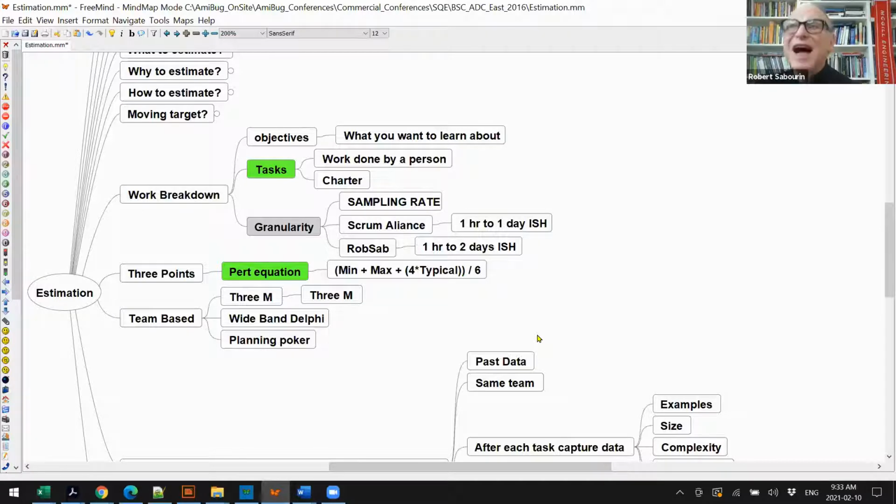Even on huge projects, I'm able to do that because I understand the test objective. I can make a list of the activities and I can basically shoot for that granularity. Of course, I'm going to be wrong, but with more knowledge of past experience, you get really good at it. And with time, you'll get better. It's never going to be perfect, but you have a list of activities at that granularity approximately. So if you think that you've got a testing activity there and it would take someone 3 weeks to do about that granularity, that's for me way too big for my estimation. I want to break that down, break it into smaller chunks.